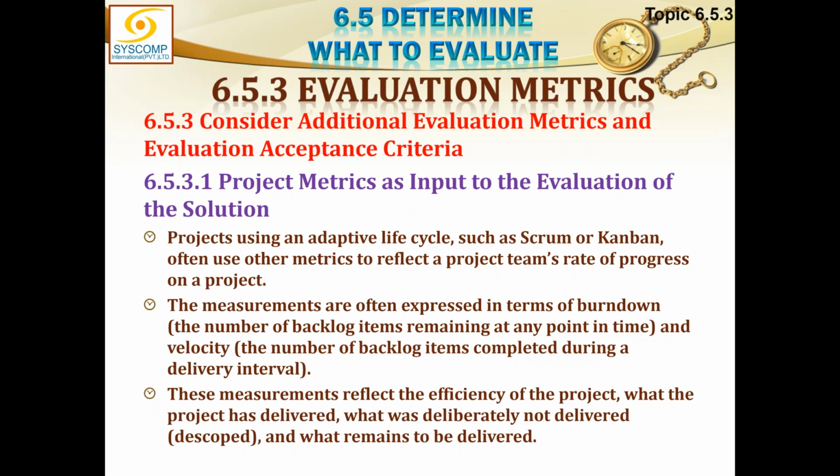So this is a reverse kind of chart which initially shows the total workload, and as we move ahead with the iterations, the tasks which are completed are subtracted out of the total work, and I keep getting a new point. This is called a burn down chart. Burn down means that the total workload has been burning out. Whatever I have completed has been burnt out. Whatever is left is the remaining work. This is the burn down chart.